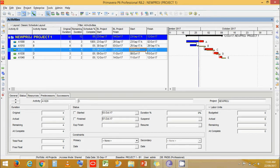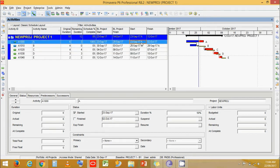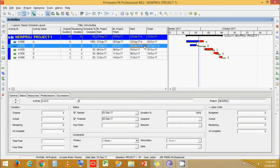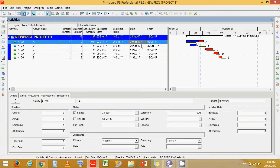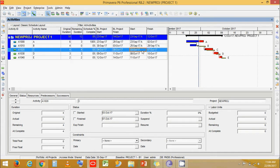That is because in Retain Logic, activity B is completed but activity A is still in progress. Activity A ends on 2nd October, and the relationship from A to B is Finish-to-Start. Therefore activity A to C will also drive a Finish-to-Start relationship.